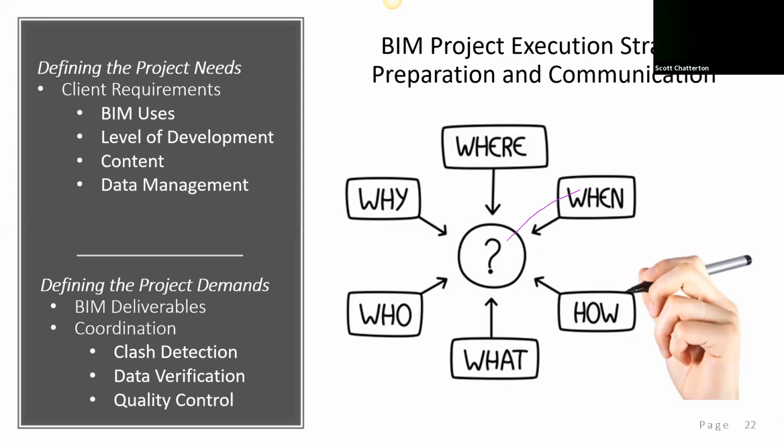And they're just stacked floors. So it's very simple. And the flip side of that is a hospital where if you peel off the ceiling, it is packed full of stuff. It's got HVAC, med gas, supports for the chairlift, so much information and coordination that's required around these. So the deliverables are key, and understanding what those deliverables are.